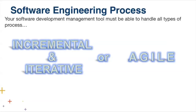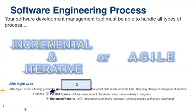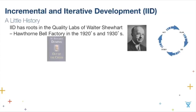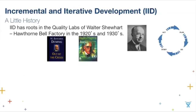The IID — incremental and iterative development — option is hidden in the Jira Agile labs: the option that lets you run sprints simultaneously. A little history on IID: it started back in the 1920s and 30s with Mr. Shewhart, who is really the guru of quality. He suggested that iterative process where you plan something, do it, study how you did, decide if you need to change something, act on those changes, and iterate. He is really the grandfather of that iterative process.